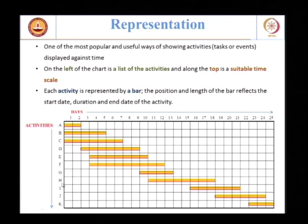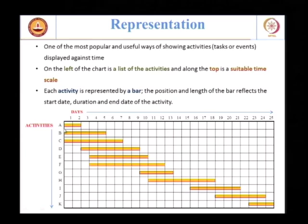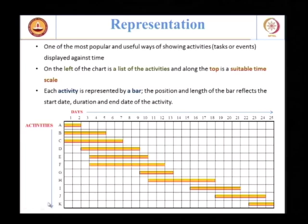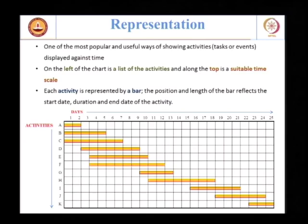On the time axis we have days. We need two inputs to draw a bar chart: activities and time — specifically start time and duration. We have the activities which we got from the work breakdown structure or some other means, we need to know when the activity is going to start, and we need to know the duration of the activity. Making it meaningful in the context of the project is really the key question, and when you draw the chart you have to decide where you are going to actually place the bar.